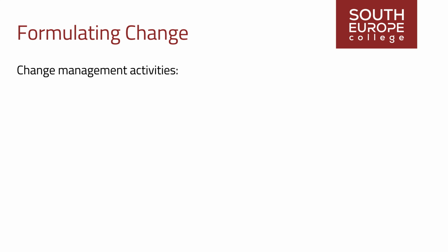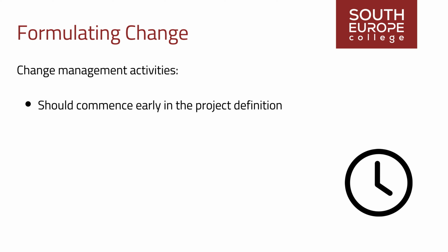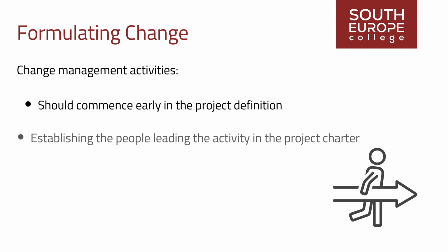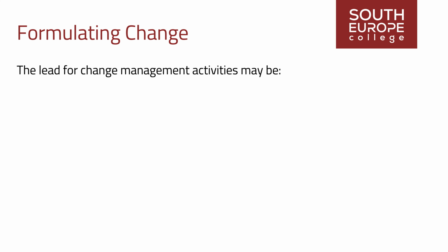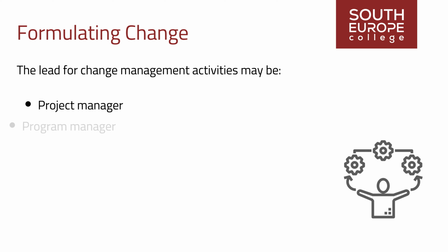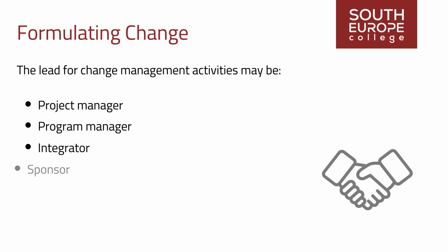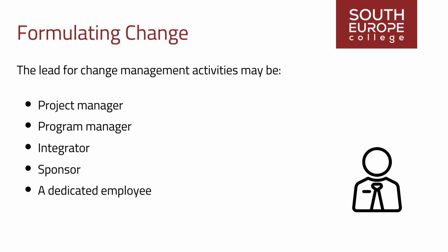Change management activities should commence early in the project definition, necessitating the establishment and definition of people leading the activity in the project charter. The lead for change management activities may be the project manager, program manager, integrator, sponsor, or dedicated employee.